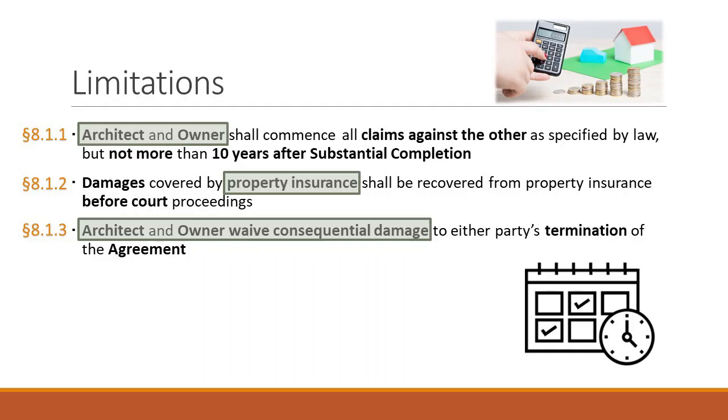8.11. The owner and the architect shall commence all claims and causes of action, whether in contract, tort, or otherwise, within the period specified in the applicable law, but in any case not more than 10 years after the date of substantial completion of the work. So this is a time frame in which you have to bring that. We talked about statute of limitations in our second or third lecture, that said you have so many years in Illinois.